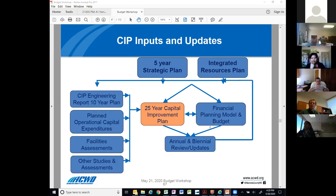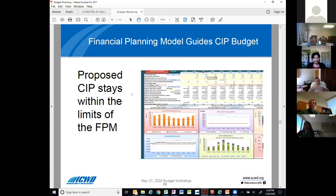That encompasses our capital improvement plan. This also becomes an input to the financial planning model in addition to our operating expenditures. Based on the results of the financial model, we tweak the budgets as necessary to ensure we are within financial constraints and that rate impacts are affordable. That information is taken back to the CIP improvement plan and the cycle continues. The bottom line is our proposed CIP for 2020 is within the limits of the financial planning model.